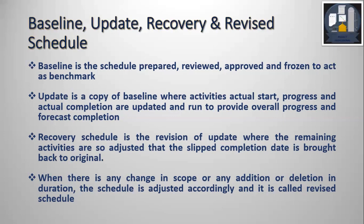The revised schedule is the one where generally there is a change in the completion date. It may be due to scope addition, deletion, change in scope or any other addition or deletion, which is reflected in the revised schedule where generally the date is shifted.